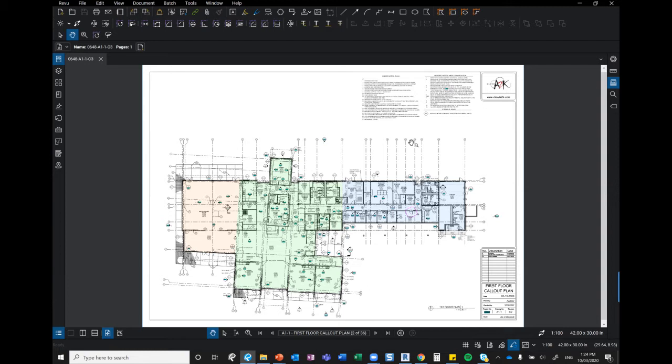Another workflow that's used quite well, as I said earlier, is infrastructure. So for them, they have design packages. It might be a package of 10, or it could be even 80 drawings, and there could be somewhere between 5 or even 50 people reviewing these drawings, and these stakeholders have different backgrounds. It might be public transport, it might be the road authority, it might be a government authority, it might be local government, then engineers and architects, then the mechanical, then project managers and the builder, and they all have a different stake in how this is going to be built. So they're going to put the information onto the PDFs.